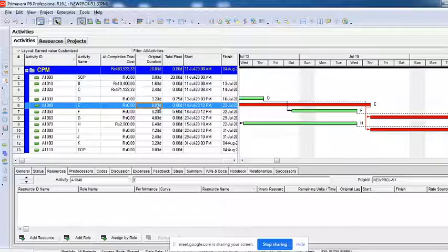I still want to compare it to 8 days, because the baseline says this activity was supposed to finish in 8 days. So the actuals that happen on the site tomorrow in the execution will not be compared to the current plan. I'll repeat, the actuals we do on the site will not be compared to the current plan. It will be compared to the baselines.